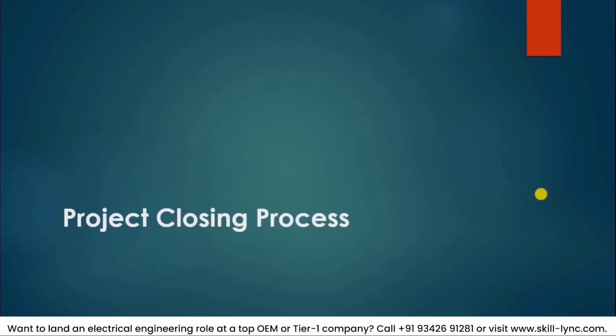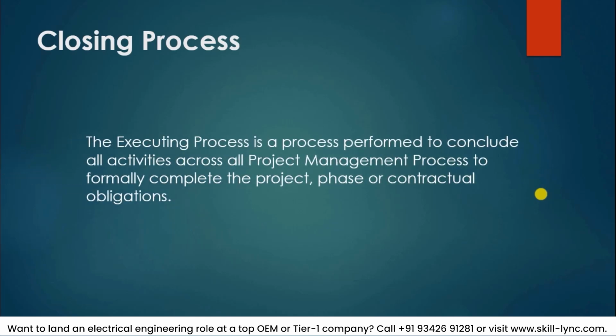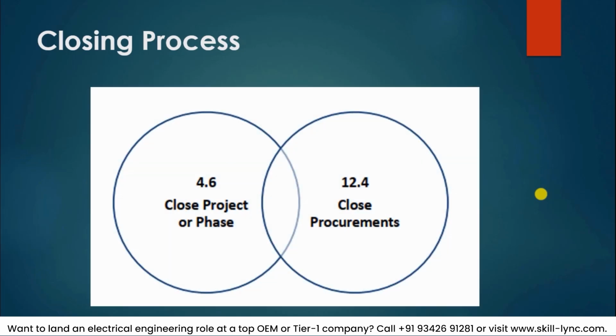So finally, going on to the project closing phase. In this closing process, to go back to the definition, this is a process performed to conclude all the activities across all the project management processes to formally complete the project phase or contractual obligations. If you could recollect, in the first stage, we started off with the project charter. So in this closing stage, we close all the project commitments, we close all the procurements.